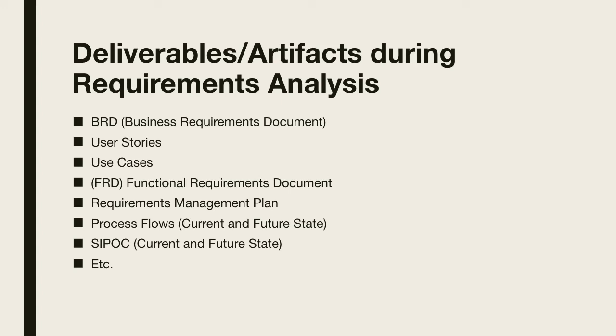And then the requirements management plan is a good tool during requirements analysis when the business analyst is analyzing all those requirements from different sources to come up with a plan in terms of how requirements are going to be captured, which functional areas are impacted, how many meetings are going to be held for the duration of the requirements gathering session.